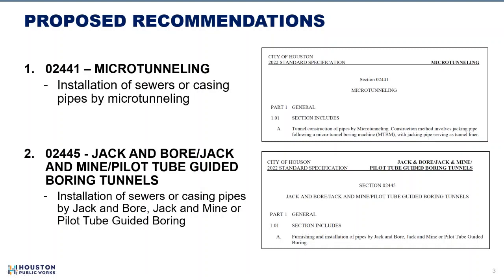The proposed recommendation is to have two standalone specifications. First, keep 2441 for micro-tunneling only — for installation of sewers and casing pipe by micro-tunneling. Second, introduce new specification 2445 for jack-and-bore, jack-and-mine, and pilot tube boring tunnels, intended for installation of sewers and casing pipe by those methods. The intent is to provide clear guidance to engineers, contractors, and project managers to select the appropriate method, minimize unintended changes during construction, and set clear expectations prior to bidding.